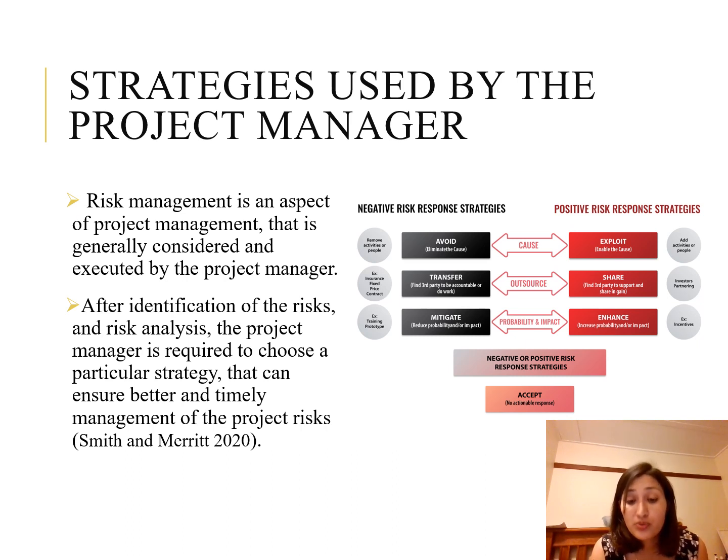Risk management is a process which falls on the responsibility of a project manager. This is the reason why the presence of an experienced project manager largely indicates project success. The choice of strategy for risk management should always be based on the severity and the likelihood of the risks on the project, and hence the risk management strategy is generally identified after completion of the risk assessment process.